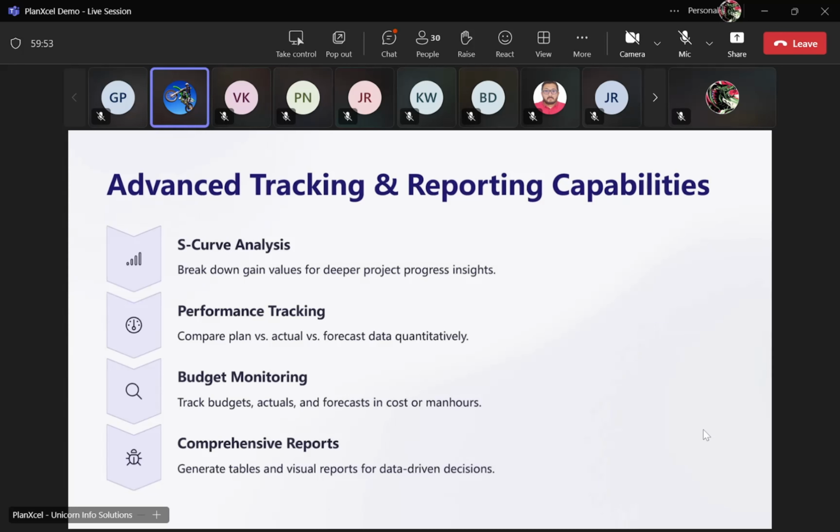and we can put the actuals against it. We can also do the forecasting of it. We can use it for calculation of the earned values, then the planned values. We can calculate the SPIs, the CPIs. All those features are available, since that is available in Excel itself. You can play around with it, whatever information you want.